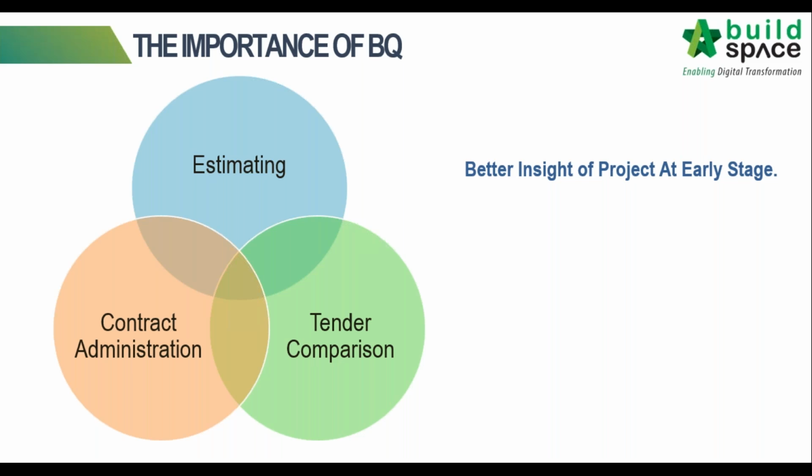And also by having the drawings and the floor plan shared by the other consultants, for example the engineer or even the architect, we can actually use the BQ to identify some of the potential problems that may not be apparent at first sight. Another reason why we still need the BQ is that the total budget of the estimate can be well analyzed in detail. The detailed measurement of the BQ quantities is great information to be analyzed and can be used statistically in cost planning like the S-curve at the early stage, which allocates the project cost and the timeline to be projected in the S-curve.